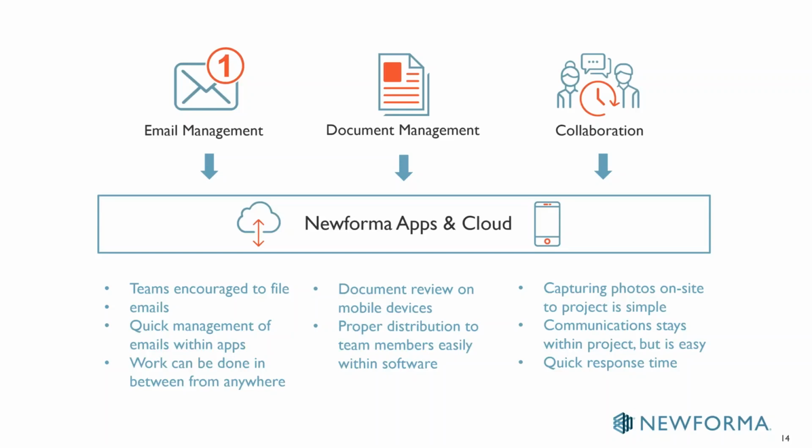And within 5 minutes of finishing that meeting, we can issue that report out to everybody, and everybody knows exactly what's going on. That's not a snagging list that comes out a week later after half the snags have already been dealt with. It's live information.